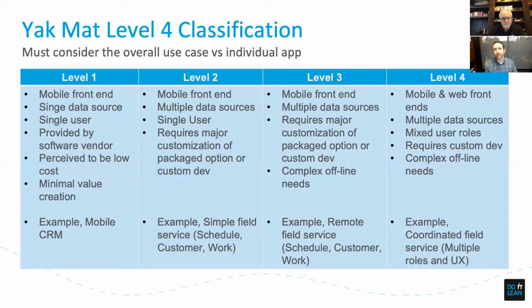And our process throughout was very simple. We identified an MVP of our first phase. We designed it on paper. We built it. We launched it. And then we moved to the next phase and we did the exact same process. Many times an MVP is looked at as an isolated piece of a project. We actually applied the MVP concept throughout the entire project for each phase that we tackled. It makes a lot of sense.